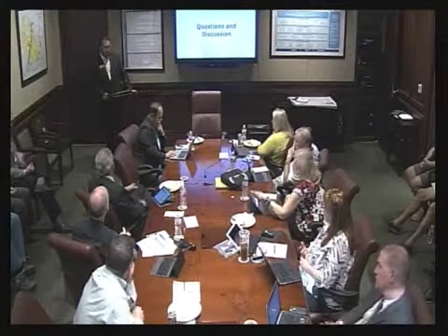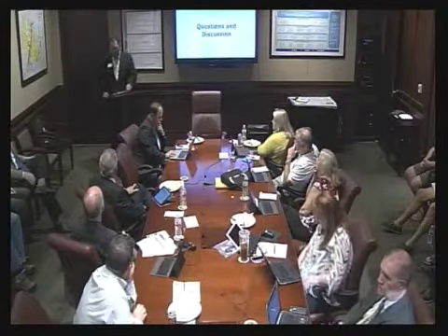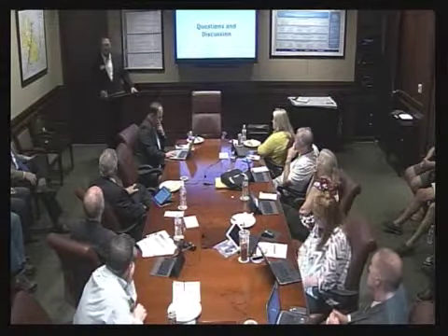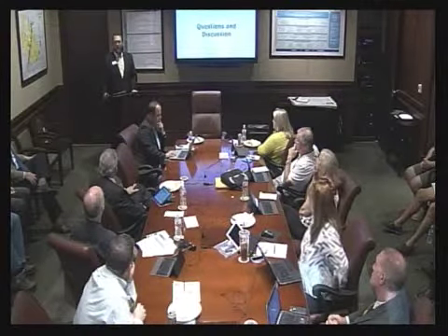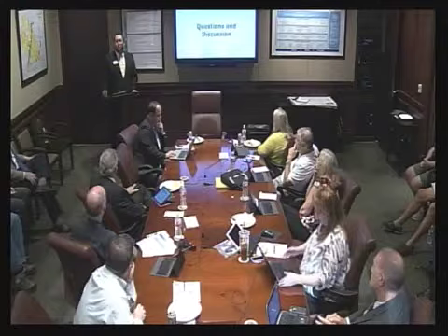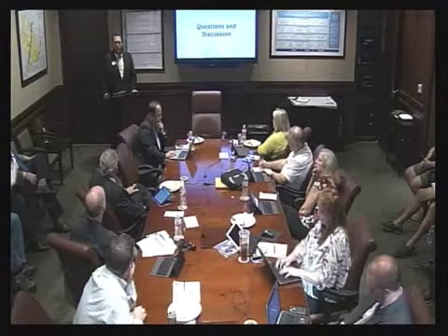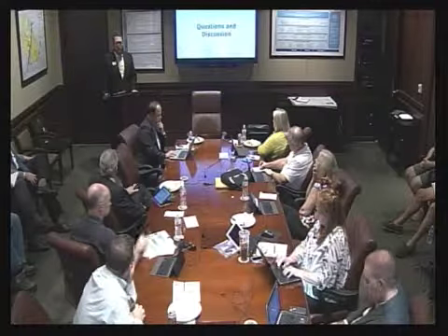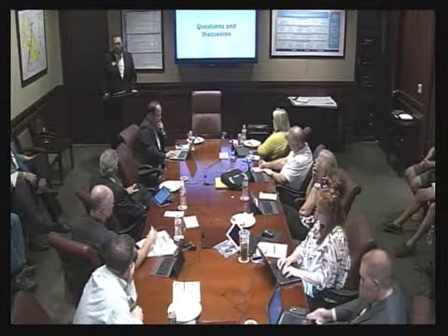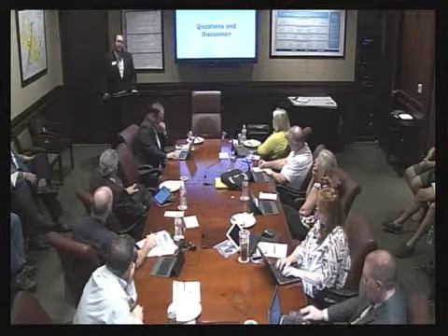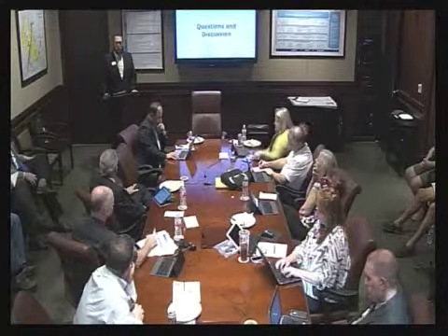Is there anything you need from us on phase one? Not at this time. We're still working with the consultant. We've had a little bit of a hiccup getting some of the final design survey coordinated, so we're running about 30 days behind on this, but we do not plan on delaying the letting at this time. We'll be back with more information when it becomes available with the phase one final design. So at this time, we're good with phase one.